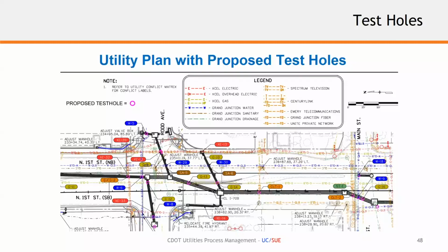So with data that we can collect previously in our QLB plan, that eliminates the need for QLA in those two situations, where we don't have that information, say, for instance, a gas line G12, G13, G14. We need to go in and test hole and identify top of pipe on that high pressure gas line. So certainly not every point demands a test hole.